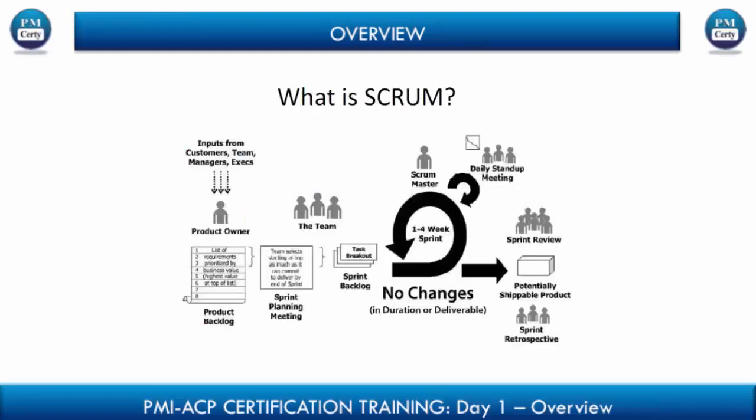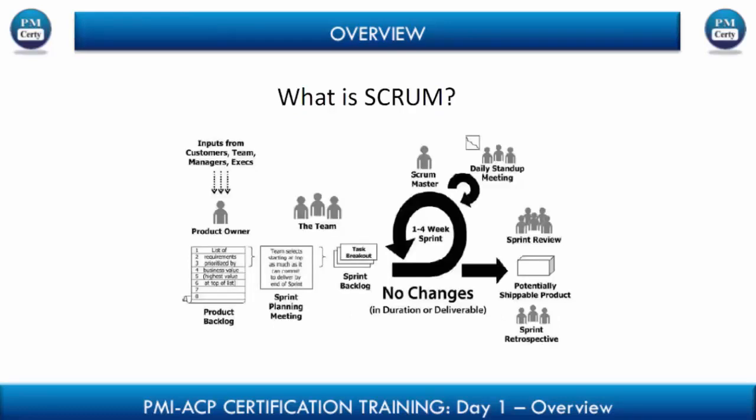So now it's a good time for us to have a look at the overview of a cycle. So you're seeing a Scrum cycle. Agile cycle is identical. We'll also be looking at it. So let's see how it works. So the first thing is the global set of requirements for the entire project. As you remember, we call this a product backlog. The term product backlog is common whether it is in Agile or in Scrum. It is the sum total of all requirements.